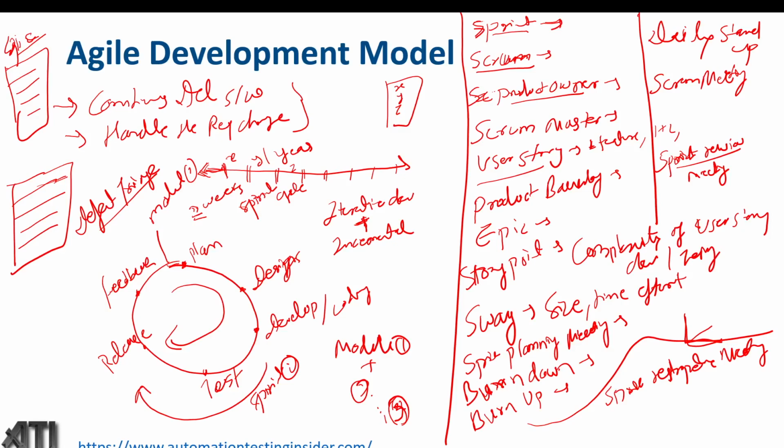Here we'll discuss the progress, like how many defects are in open state, and whatever defects we have closed. But basically we'll discuss how many defects are in open state, and we'll prioritize them to fix them as soon as possible. In case any defect is not important, then we can defer it to the next sprint. Do not worry about the defect related things, guys, like what it means to defer a defect, how to prioritize, or how to give the severity to the defect. We'll discuss that in the defect life cycle later on.